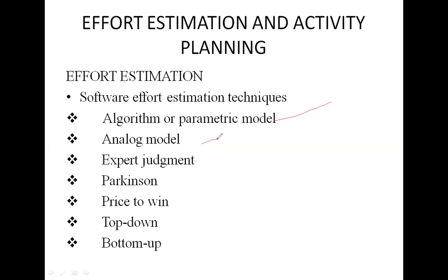and based on that we estimate the actual effort. So here a similar project is identified and by using that we estimate the actual effort. We call it an analogy model. Then expert judgment: here we estimate the effort based on the advice of experienced and knowledgeable staff.